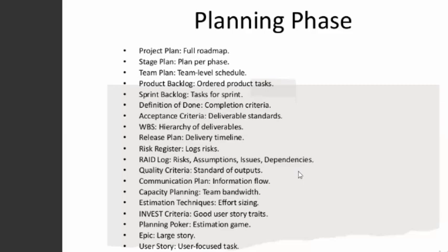The acceptance criteria is that I should be able to click, and this button should pop up a form where I should fill in my username, my password, my other credentials. But I'm clicking and nothing is popping up. So it does not meet the acceptance criteria. Therefore, it does not meet the definition of done. So something needs to be done. We need to go back into the works and fix.